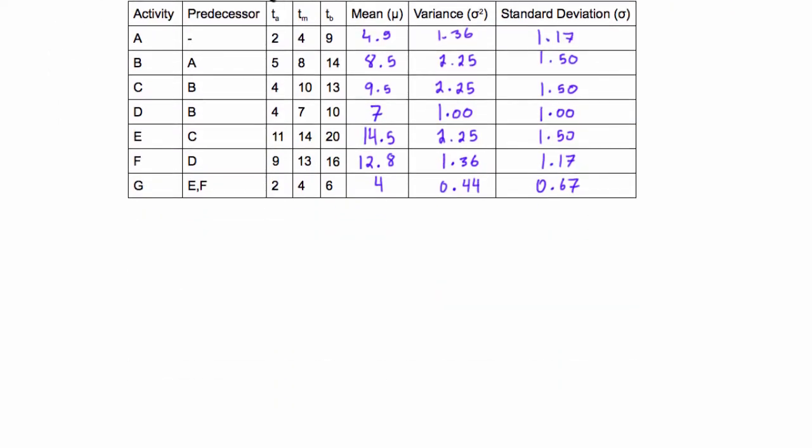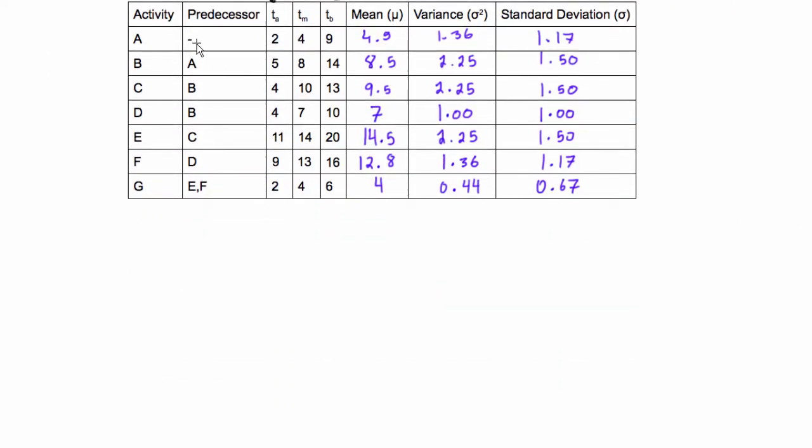Let's look at this. Activity A has no predecessor, so activity A will come first, and then activity B depends on A. So we already know what the first two arrows and nodes will be in our CPM network diagram, so let's go draw them in.